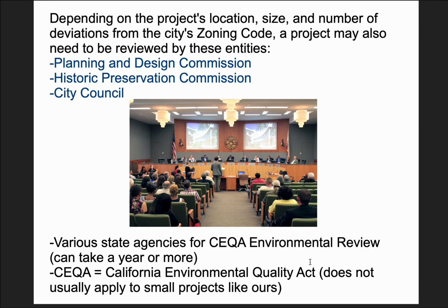You might have to go through the city's planning and design commission and present your variance or your application. And this is like a small courtroom event. You have your design or planning commission, and you have either PowerPoint slides or boards to show what you want to do. Interested parties can attend, because it's posted ahead of time on the agenda. Some of these people might have objections, and they will all hear everybody's opinion and take on it, and then decide whether they want to approve your variance or your application or not.